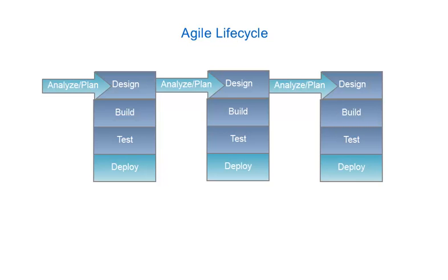Although the phases represented in an Agile project are basically the same as those in a waterfall project, note that the design, build, and test phases are all happening at the same time, and small deliverables are released frequently instead of at the end of a large project.